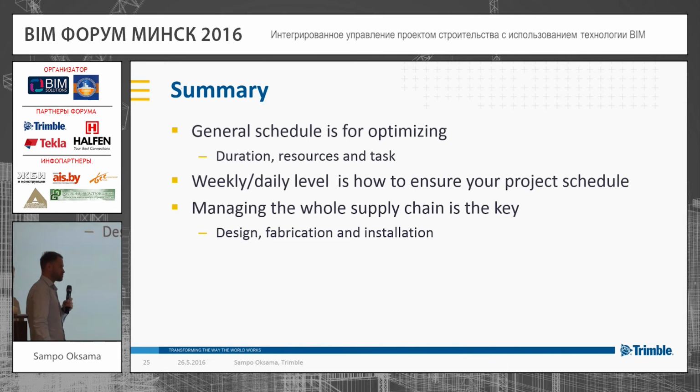Then we went to Tekla Structures to do a more detailed weekly or daily level plan. This is really important so that you can follow your progress on a weekly or daily level to make sure that you stay on time. And like we saw in SIPO's logistics center, it's not only the installation, it's also the design and fabrication. If the design or the fabrication is late, it will affect the installation also.